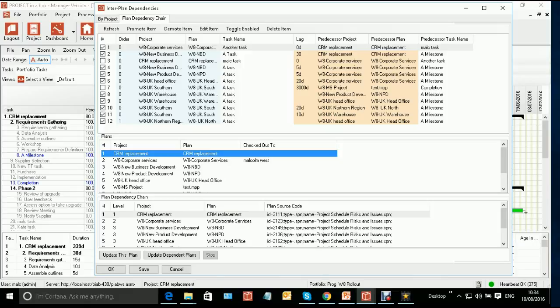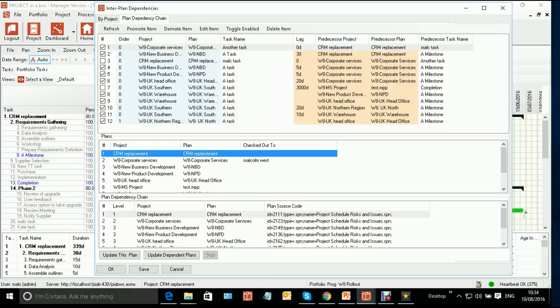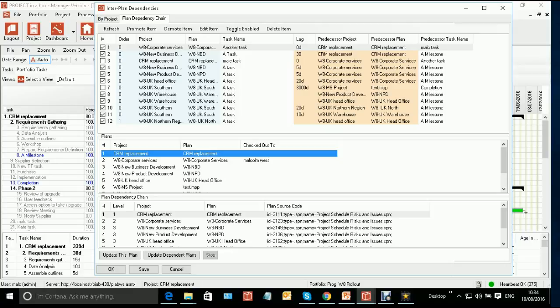Now, even if we check out our first plan and there are no changes to it, we check it back in, it is still going to go and check out the other ones. There's a very good reason for that, which is that there may be other changes happening in plans further down and we don't necessarily know what the previous version of the plan said in terms of dates. So just to be sure, every time you check this plan in, it will trigger the cascading chain of checkouts.